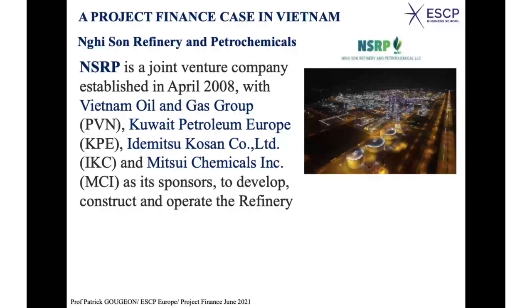Why Kuwait Petroleum Europe? Just because you need to have the raw material, the fuel, to feed the refinery, and therefore you needed to have a guarantee of supply, which was provided by KPE, Kuwait Petroleum Europe. Idemitsu Kosan Limited, IKC, and Mitsubishi Chemical were included as sponsors to develop, construct, and operate a refinery. So the sponsors are either companies with an expertise in refining, or a supplier, which was the case for the Kuwait Petroleum Europe company.